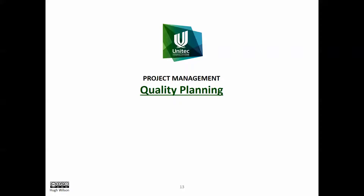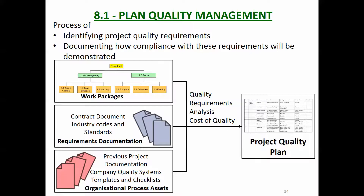In this video we're going to look at quality planning. Quality planning is PMBOK process 8.1 — Plan Quality Management. It's the process of identifying the project quality requirements, documenting how you're going to achieve them, how you're going to do the inspections, and how you're going to demonstrate that that work has actually been done.